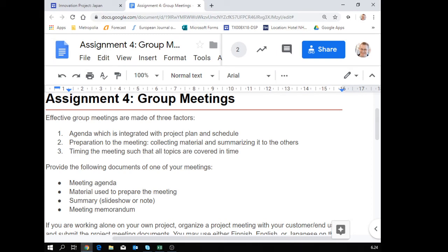Salary is actually flowing, although you are not using it. So you cannot balance the project by releasing allocated resources unless you have somebody who takes that allocated resource. Yes, you can do those kinds of deals.